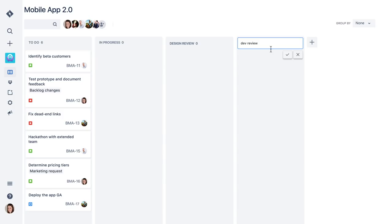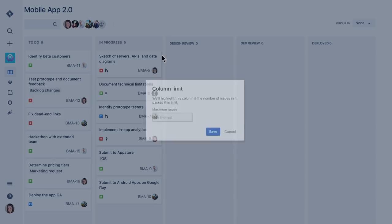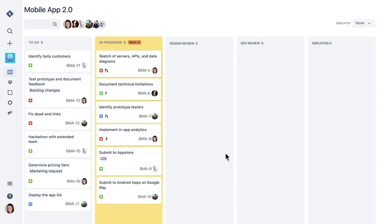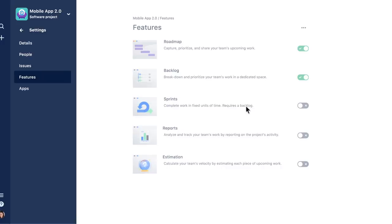While they capture work items, I'm going to jump on the board and set up a workflow. I know our team wants to keep work moving, so I'm going to turn on column limits to help everyone prioritize their work and stay focused. If the team decides they aren't helpful for this project, anyone can just switch them off. I'll also turn on sprints to make sure everyone knows exactly what work we've committed to.